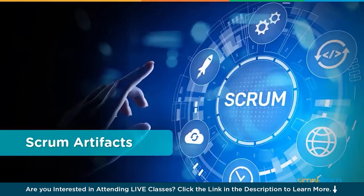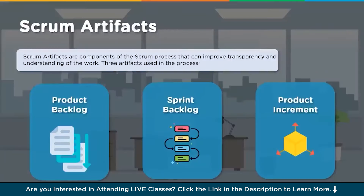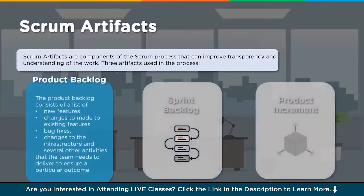There are certain artifacts in scrum that improve transparency and understanding of the work. The three main artifacts are the product backlog, sprint backlog, and product increment. The product backlog consists of a list of new features, changes to existing features, bug fixes, infrastructure changes, and other activities the team needs to deliver for a particular outcome. This list is prioritized in the order it needs to be delivered, and as the project progresses, new backlog items are added.